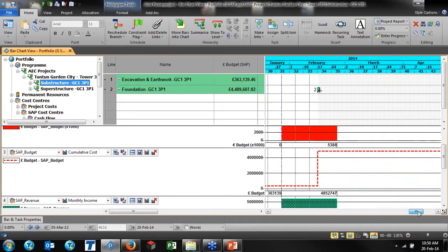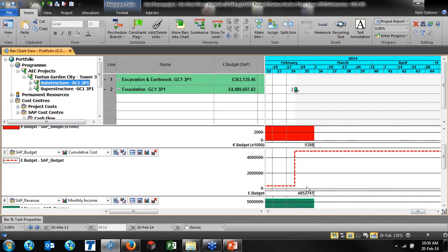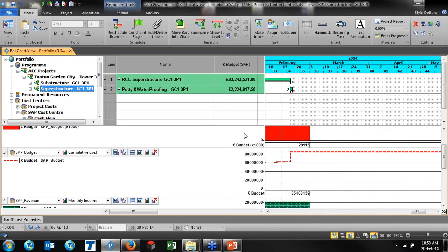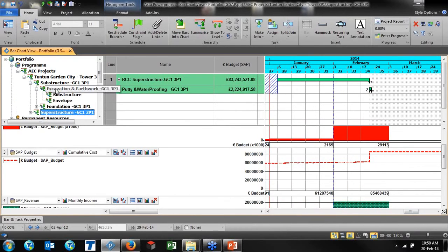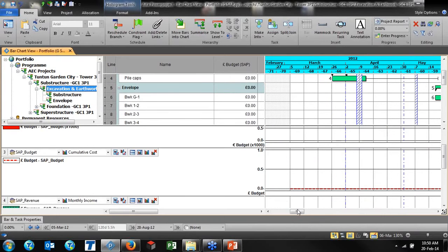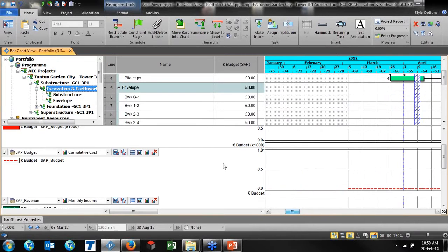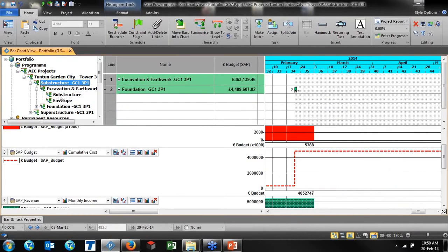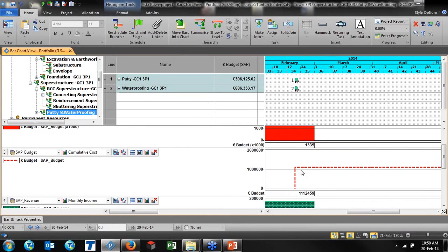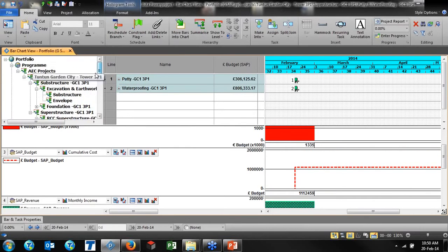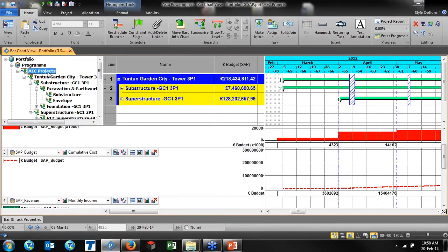And here actually it is showing there is too much difference, and it is just having a gap here. And please see now, wherever I select, for example, superstructure, it is showing the cost for this part. So wherever I would like to focus, for example, the excavation, if there is cost for it, it is showing for substructure and for the superstructure, and it is simply showing the data where I select. So it will enable you to analyze dynamically.